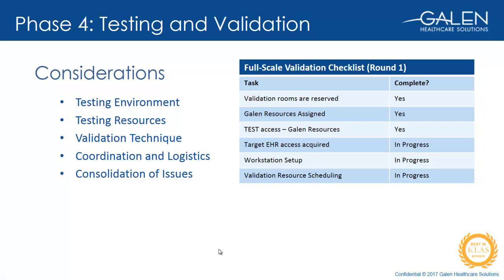Whatever the approach, a reliable plan to load patients and keep them updated in the test environment has to be worked out prior to forging and loading clinical data. Another important consideration is that very often clients will have multiple projects occurring simultaneously, and it will be important to know what, if any, other project work is being done in the testing environment. In many cases, a timeline will need to be collaborated upon to make sure that we are not interfering with other project teams' work and vice versa, that our data migration work won't be compromised by other project teams using the environment.